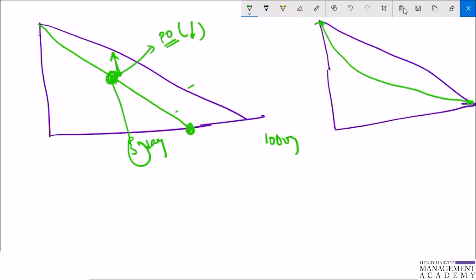So the team with such progress has a problem now. The problem is either the team committed to less than what they are able to complete, or the product owner does not provide any story for the sprint. And the reason might also be an overestimation of complexity, which ends up in completion earlier than expected at the beginning of the sprint. And the Scrum Master should identify the problem earlier and ask the product owner to provide the team with more work. So even if stories are overestimated, the team should at least continue with the stories from the next already pre-planned sprint. So this is not an ideal graph, but